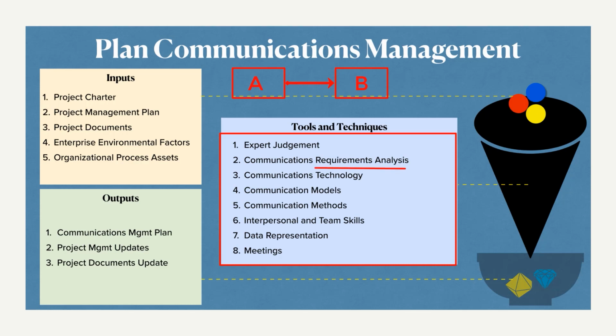And then we have communication technology. It is also a very good tool. But to make full use of this, we as project managers have to make the technology accessible to all the stakeholders. Some stakeholders do not have access to all the tools, so we have to make sure that all the drives are being given access to, and all the SharePoint links are accessible to all the stakeholders. So it is not just installing the software, but all the related accesses have to be ensured.